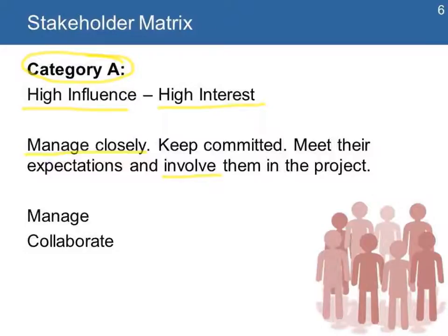So these are people who are kind of the sponsors of the project. They have the power, either access to resources, but they are very interested in the project, so they are supportive. So it is a group that the project manager needs to work with closely to make sure they're using those resources, and also taking advantage of that high interest they have in the project.